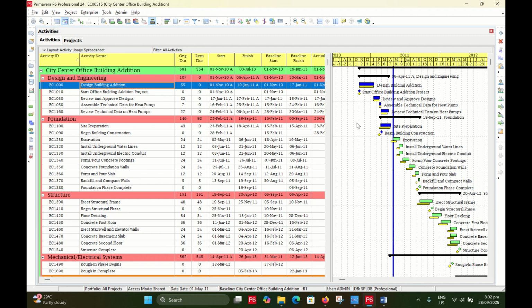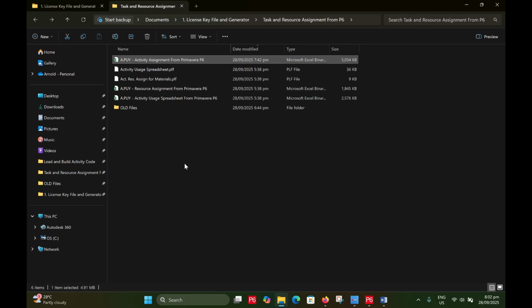So this is useful because if you are going to submit any extension of time claim, most of the readers or people are going to read the narrative, including the delay analysis. They'll not be able to understand what Primavera is. Not all of them, but most of the stakeholders, they'll not be able to understand what Primavera is. Only the dates they'll be able to read those dates.